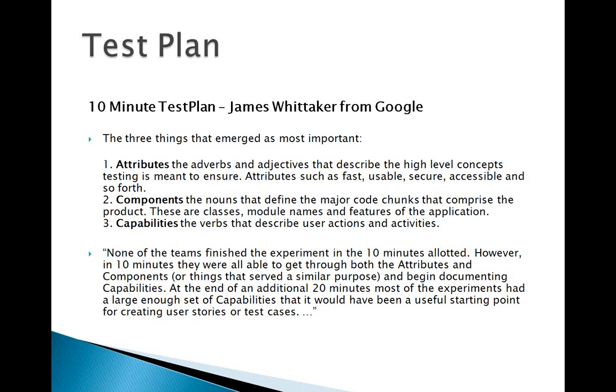And varied kind of test plans. And one of the things that he came across was that the thing with the detailed test plans is that as the project starts, at the beginning of the project, you have all this stuff. But when the project pressure takes on and the requirements are changing, and you are dealing with the execution issues, these test plans are forgotten, and updating these test plans becomes a real headache. So it's a one-time documentation which is hard to maintain, and then it is not really useful.